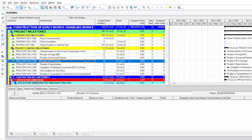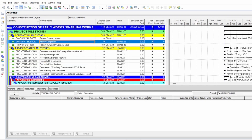First, the requirement is that we have the baseline program. It is better to have the baseline program produced first and get consensus from the consultant before loading the cost or resources. This program is assumed to already have initial approval from the client or consultant. The cost assigned is 306 million 629,000 571.68, based on the BOQ, which is a contracted document with prices mutually agreed between the client and contractor.